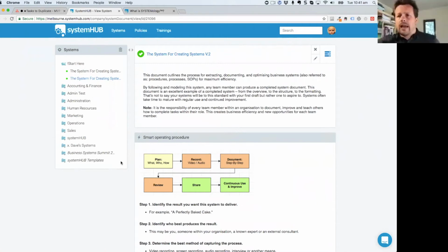And then not only that, the updating it, the maintaining it, it wasn't actually built for that. So I always really caution against people trying to create checklists in your how-to system that need to be checked off, because then that starts to blur the lines with project management. There needs to be a central source of truth that your project manager can go to and say, hey, I know who is doing what, when it is due. I can tell if it's been done as well, and they've checked it off. There has to be a central source of truth for that.